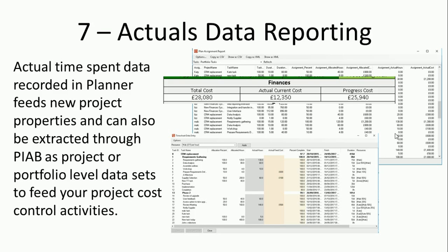You can go in, and have always been able to go in and then say, well, actually I have currently spent 3 hours, or I've spent 5 hours. I come back the next day and I've spent 10 hours, and I can fill that in with my actuals data. So we've been collecting that in what we call a timesheet data entry within Planner. This isn't proper timesheeting as you would do in a finance system where we're recording sick hours or holiday or overhead activities. This is about recording project accounting information. So we're putting our actuals data in.